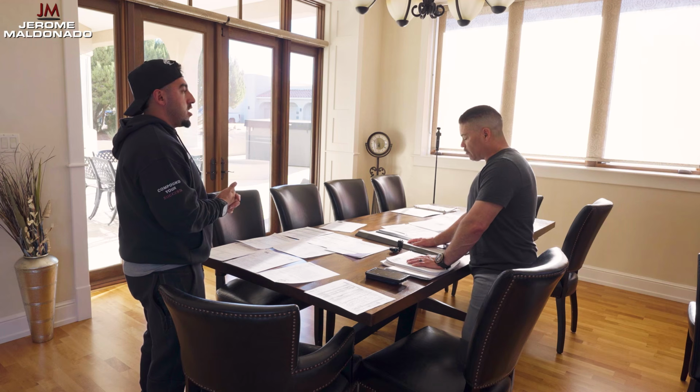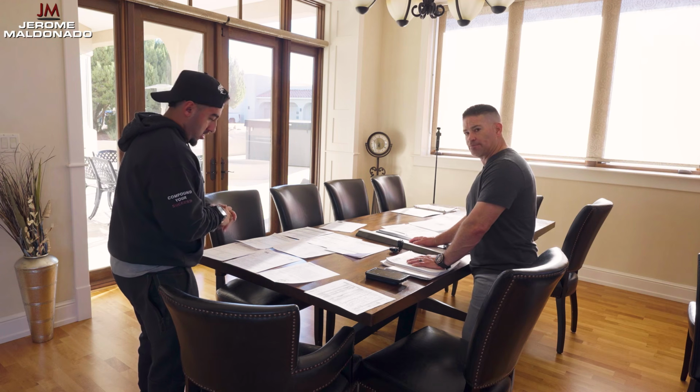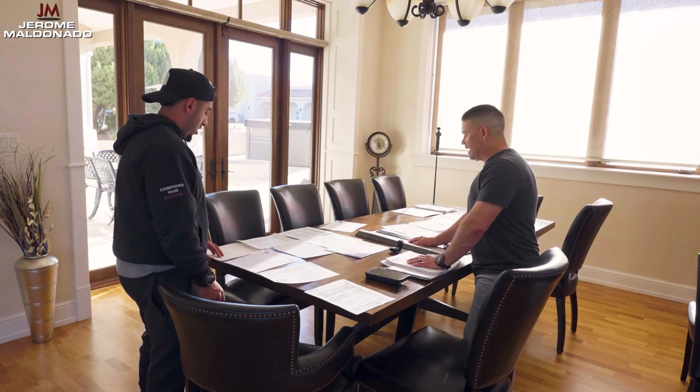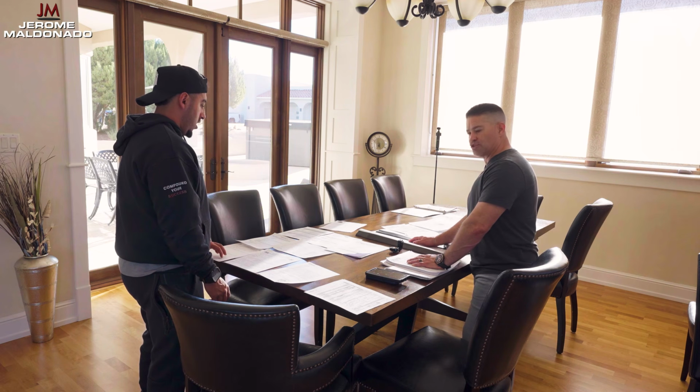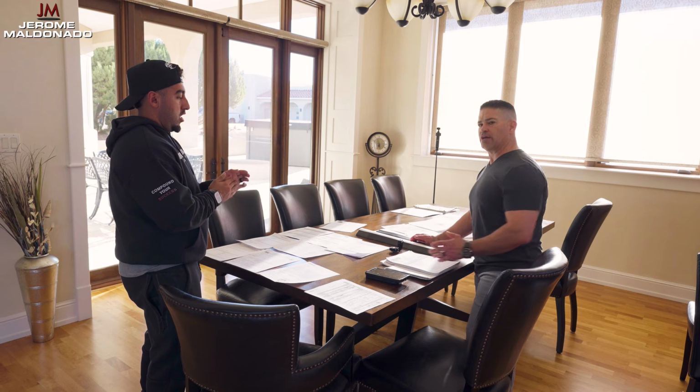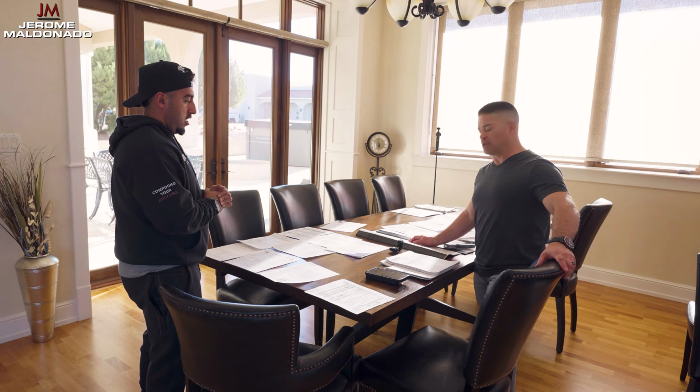If you're doing electronic submittals, you only have to submit them one time, because obviously if they're electronic, you can easily save 2 sets. And so they will make the comments. They'll share a file, and that file is shareable. So if you do an electronic set of prints, because they are shareable, you only need to submit one time.